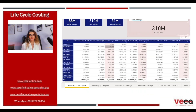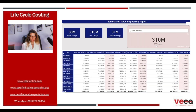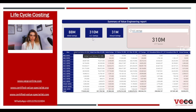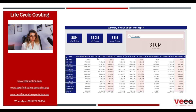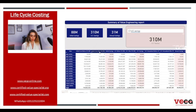This was a brief overview of life cycle costing. Now, how could life cycle costing accelerate decision-making? As part of our value engineering reports, we calculate the life cycle costing for each alternative. It is useful to highlight to our client: the initial cost of each alternative before value engineering, the initial cost after value engineering, the initial saving, the life cycle cost before value engineering, and the life cycle cost after value engineering.